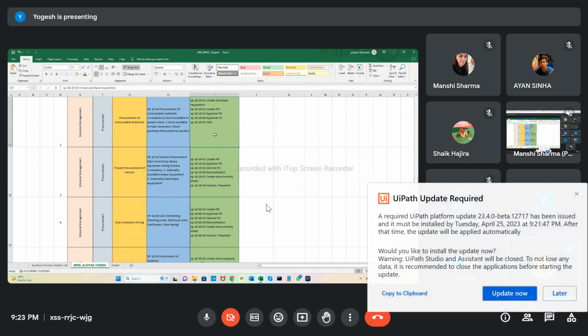So case 4. Now nowhere is the stock available. First case, project site, there is no stock. Second case, central warehouse also there is no stock. Third case, in another project site also there is no stock. Right. And now we are going to implement the fourth process called external procurement.